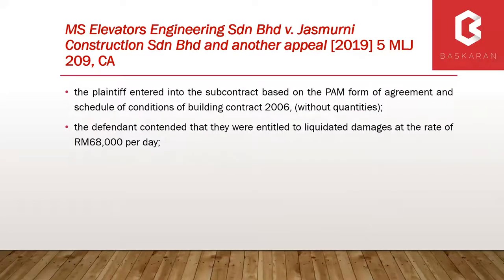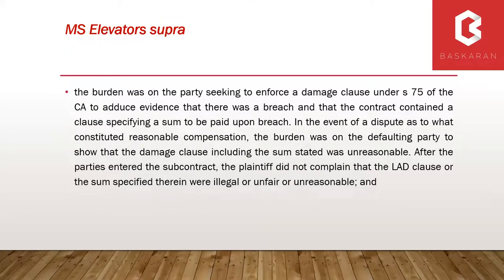There have been judgments subsequent to Cubic that have both applied it and questioned it. A subsequent Court of Appeal judgment in MS Elevators — interestingly on the PAM form of contract, albeit the earlier 2006 version in relation to a subcontract — basically applied the Federal Court's judgment in Cubic. The court recognised that all that now needs to be done is for the employer to show there is a breach of contract and a provision in the contract allowing for liquidated damages, and with that the employer would be entitled to recover those liquidated damages.